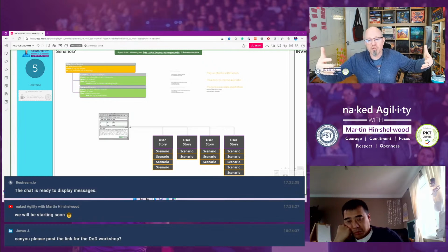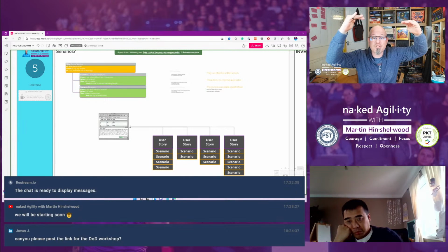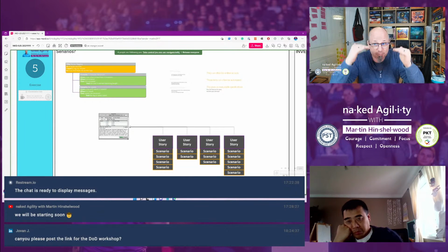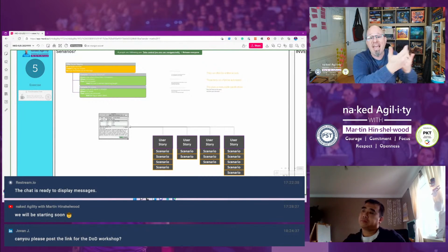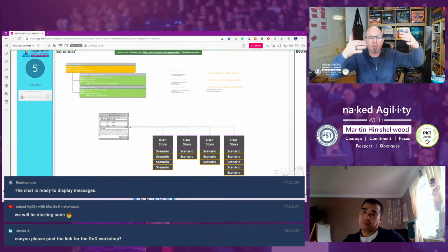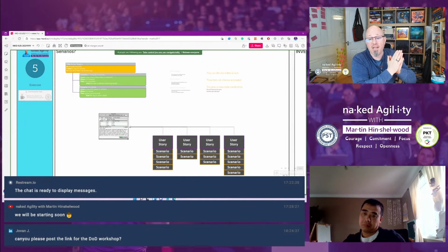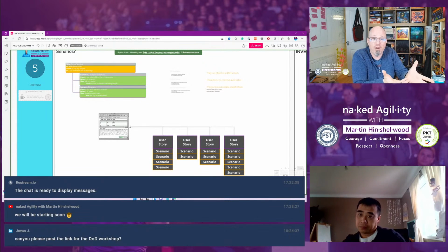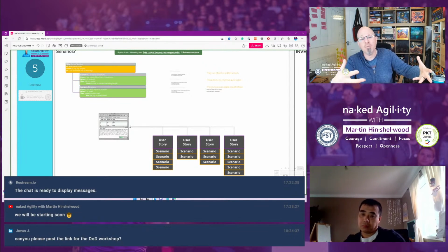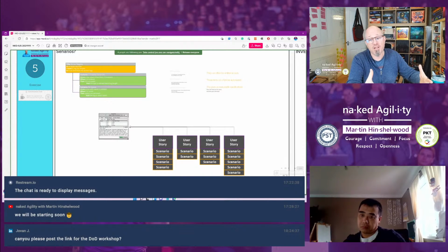We've built out some user stories, and then as it gets closer to the top of the backlog, closer to being ready, right? We then go in and we start talking about scenarios and build out the scenarios, turning any acceptance criteria into scenarios, having more conversations about it till that thing is ready. And then we can walk into sprint planning and we know what that thing is. We understand what the business problem is we're trying to solve, how complex it is, how many bells and whistles we need to have on it.